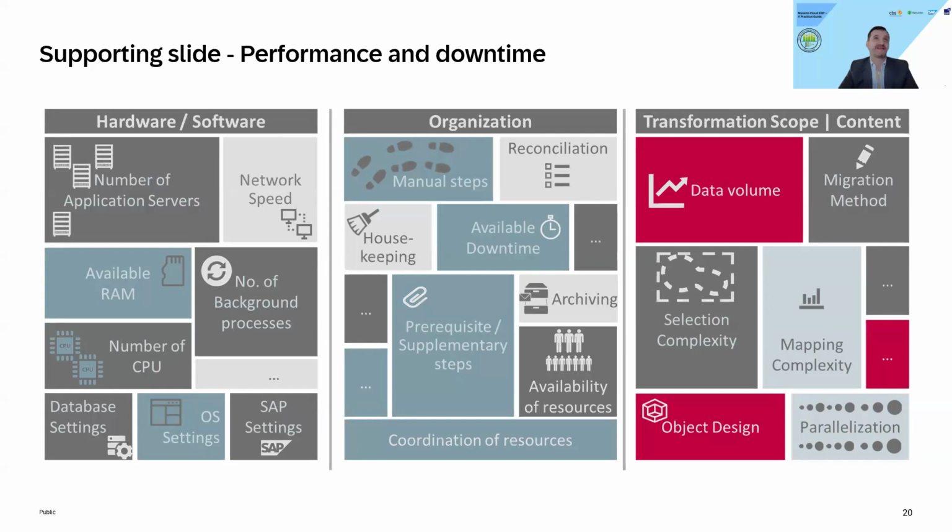However, for an extreme mix and match, it sometimes happens that we do some specific SDT processes to build a new instance, and then we move the data via the migration cockpit. But I would say this is a very low end of SDT projects. Typically, SDT is chosen because we can move historical data. But there are a few cases where we do a mix between a new implementation and the shell, and we use our tools to do that. And then we move all open items and only open items and master data.